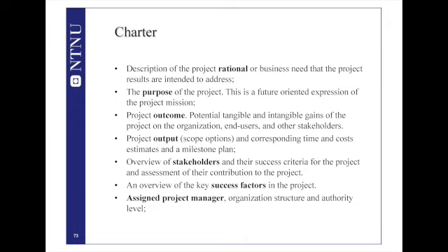It's simply that. But you have to reflect on that. You have to identify the main guidelines of how you will be managing your project. And finally, you assign a project manager, identify the organizational structure and authority level. This is the charter, or the main components of a charter.